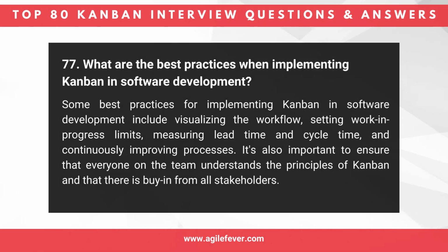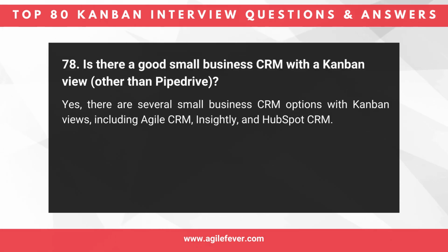Question 77. What are the best practices when implementing Kanban in software development? Some best practices for implementing Kanban in software development include visualizing the workflow, setting work in progress limits, measuring lead time and cycle time, and continuously improving processes. It's also important to ensure that everyone on the team understands the principles of Kanban and that there is buy-in from all stakeholders.